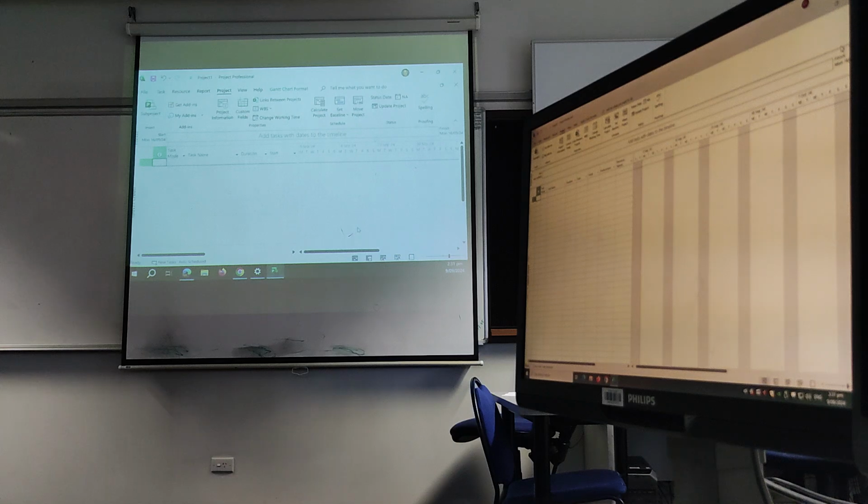And whatever you do to the resources and stuff like that, it will stay there like a rock. What you're trying to do is build a mathematical model which, when you start making adjustments, will adjust automatically. You put a date in there and all of a sudden you've constricted the whole process and it's not going to be able to automatically calculate stuff.